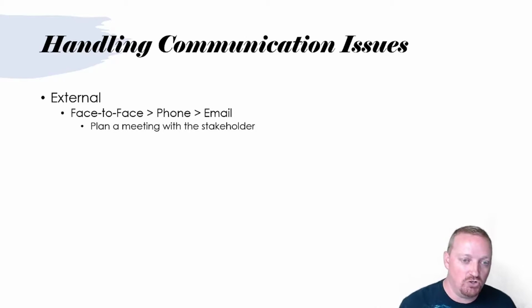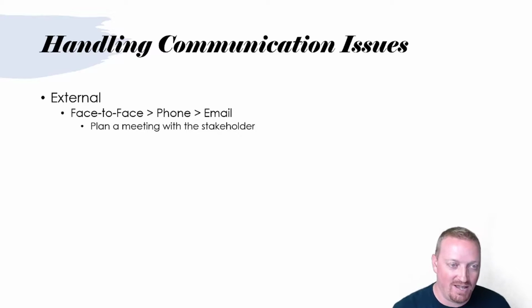I don't think you should be trying to put the communication, the meeting, and the story in the same iteration. I think that's a mistake. You should be trying to replace your story with a meeting, and then once the meeting is done, you can do the story in the next iteration.